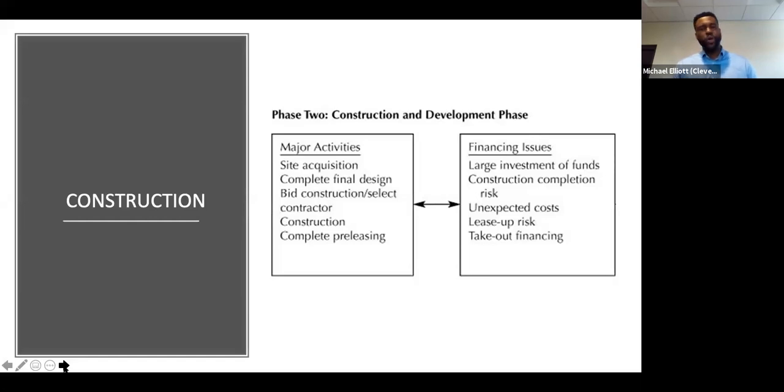Bargain I have had many situations where projects start in the city of Cleveland, and unfortunately, for some reason, they can't be completed, or they're being done so over budget because of unexpected costs. I'd pretty much guarantee that it's probably going to be over budget in many cases. And that's why many contractors and developers build in contingency amounts within their construction. Basically, if there are any cost overruns, there's some built-in cushion within the project to make sure that it doesn't get too out of hand.